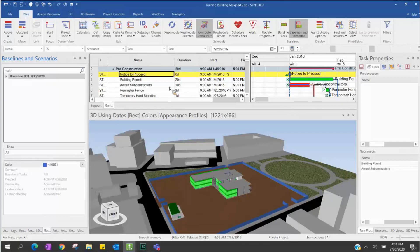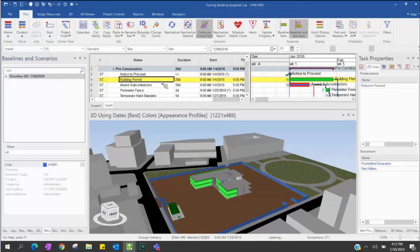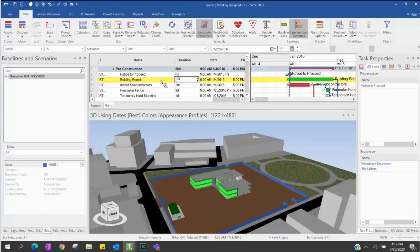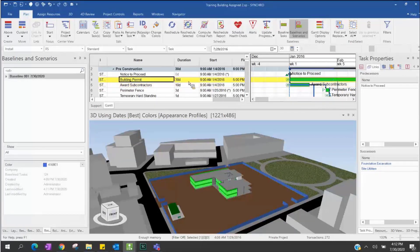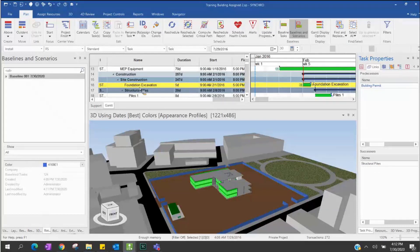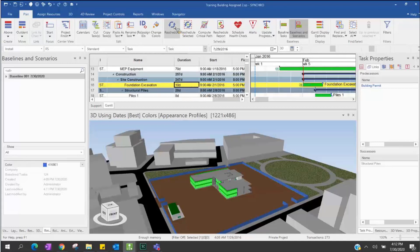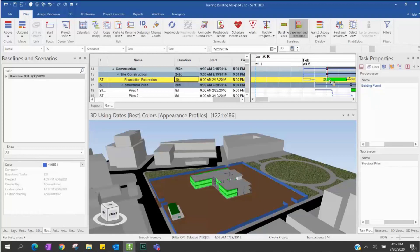Now I have created my baseline and I want to change my schedule. For the building permit task, it takes 20 days in my original schedule, and I want to change that to 30 days because the process is going slow — we need more days to get the permit. I'll also go to the foundation examination task, which is five days, and I got information that this one also needs more duration. Now let's reschedule and see the difference between my baseline and my current date.